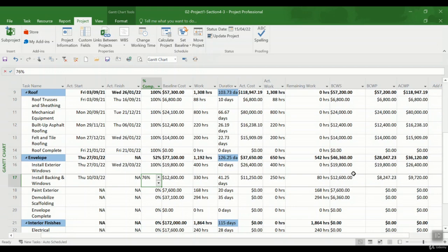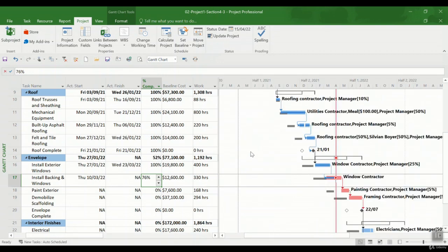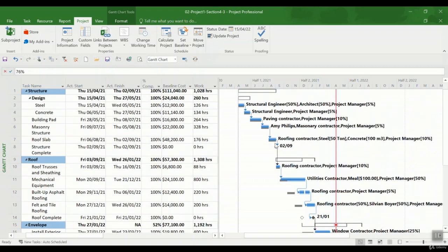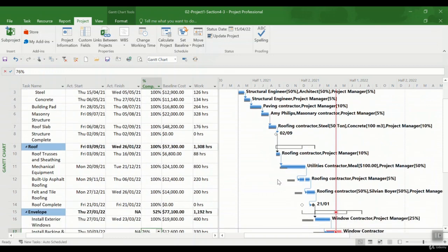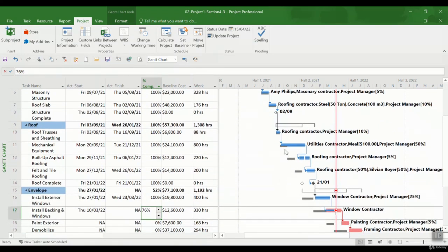I'm going to show you the S curve, or the earned value curve, here in the report, so you are able to visualize it better and compare it with the result that we saw in the previous video. As you see here, some of the tasks are completed according to the baseline until the end of September, but from the end of September, due to some delays, some of these tasks were delayed.